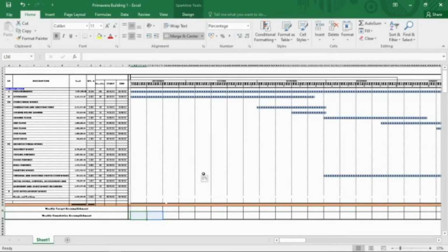We are going to create an S-curve for our Gantt chart. To create an S-curve, we need cumulative progress data. So what we're going to do is sum up all the data we have in the vertical cells in the Gantt chart area. So here,